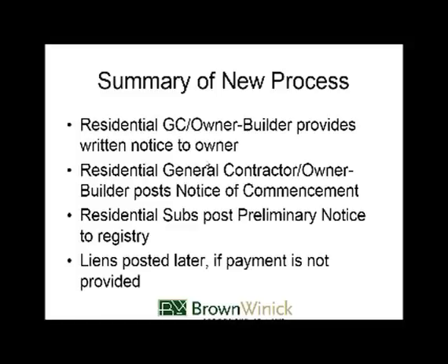If it's a one-time hitter where a repairman goes to somebody's house to fix a couple of light switches, well, the maximum amount of that bill is probably not going to be very much. A lot of these decisions on whether you want to go to the time and effort of protecting yourself will probably be based on what's the ultimate bill going to be. And if it's a small amount, I've got clients who just don't even bother. If it's a larger amount, then they take the steps required to protect themselves. So that's how I see a lot of those.